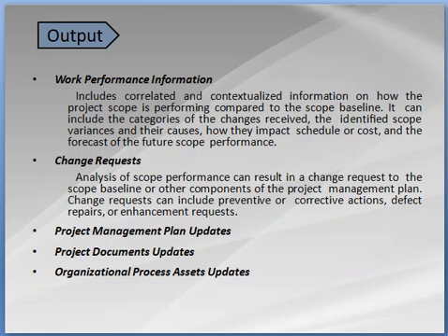Change requests. Analysis of scope performance can result in change requests to the scope baseline or other components of the project management plan. Change requests can include preventive or corrective actions, defect repairs, or enhancement requests. And the three other outputs which we get are project management plan updates, project document updates, and organizational process assets updates, which can be used further for other subsequent tasks.